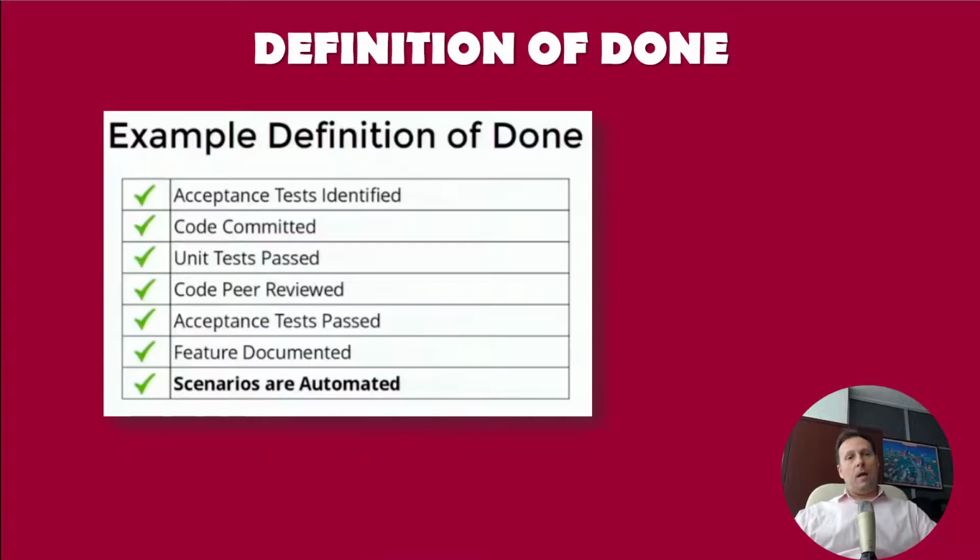Okay? Now, an important part of Scrum is the definition of done. The working product increment that is delivered at the end of the sprint must be done. It is the responsibility of developers to define the qualities that determine when a product is done. Typically, a feature is considered done when the feature is coded, tested, and documented. And then the team must completely agree on what done means.